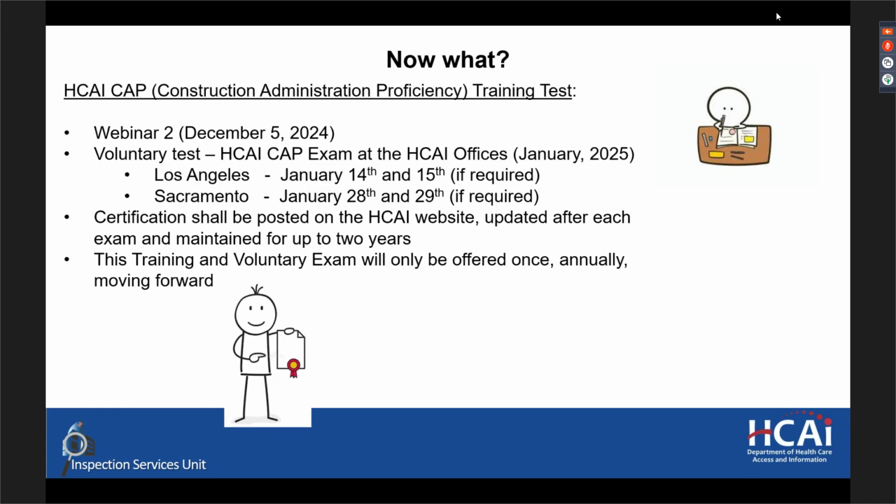Wouldn't be indicated on the form, like the NMA cover sheet doesn't have a place for that, but your NMA log should have a column for who concurred with the NMA and when. And if you are seeking to use that 30-day rule, I would suggest putting in a column that says date of issuance and then 30 days later, date of automatic acceptance.